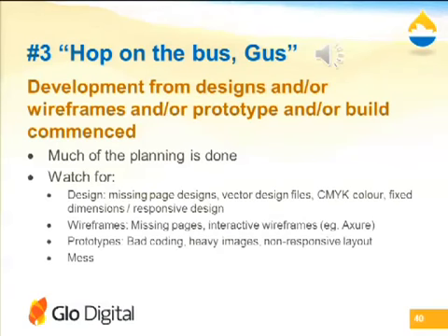It gives you interactive wireframes that actually work. You can do links in it and menus and all sorts of stuff. But therein lay a bit of a caveat, because with a working prototype like that, they control it; that's actually the specification. How do you lock that down? So what I did was get them to produce a PDF from it, which did not have the interactivity, and we still ended up with a few little gotchas, functionality we didn't realise was there. All this really goes to being able to define what you're agreeing to fairly carefully.